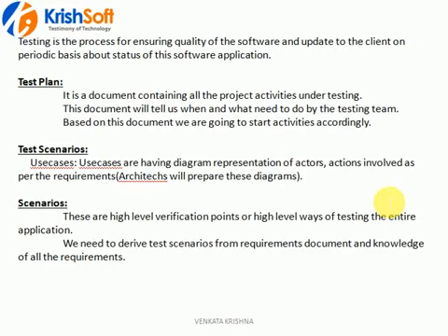This test plan will talk about who is working on the project, what is in scope and out of scope of the functionalities, what software and tools we are using, when we are starting the project, when we are ending, what different deliverables we need to give to the client, what the bug life cycle is, and what the resumption or suspension criteria are. All of these are involved in the test plan document.